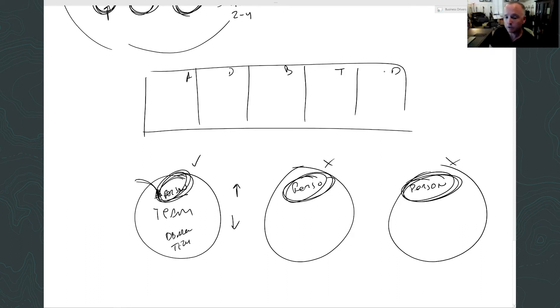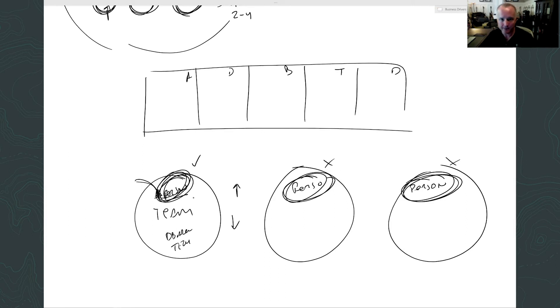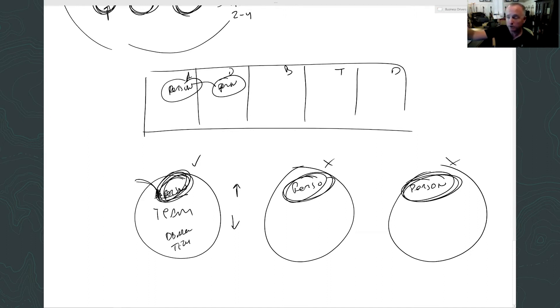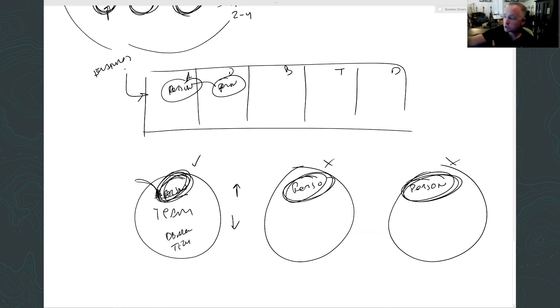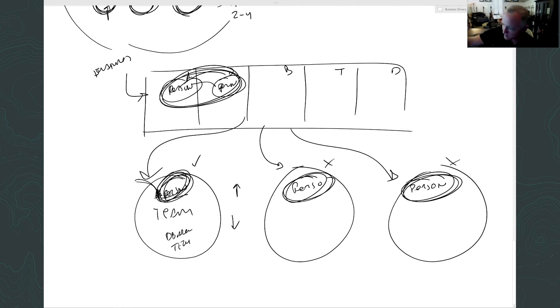What I might do is take this person if they're like a specialist contributing to the architecture design or definition of the feature, and put that person up here, have them operate on the highest priority features coming in at this level. So that when things go down here, when they get into build, that person's expertise is captured in the backlog and they're an available ad hoc resource for this team.